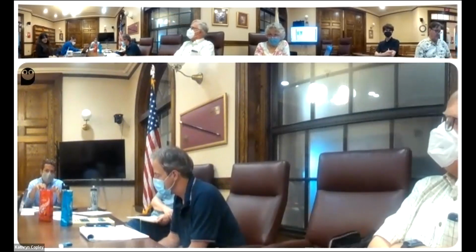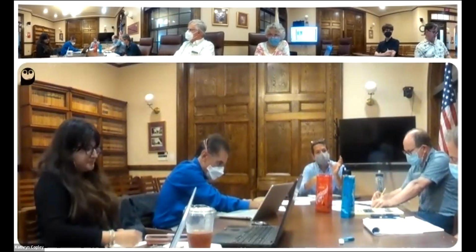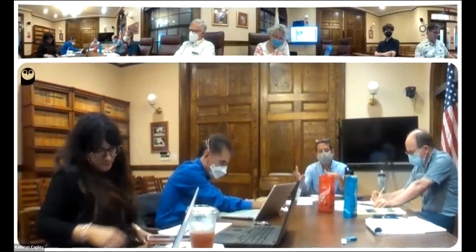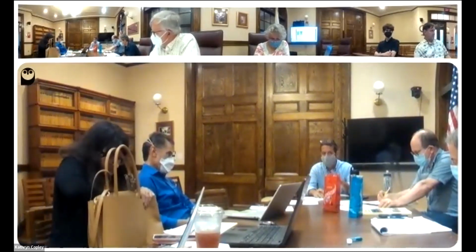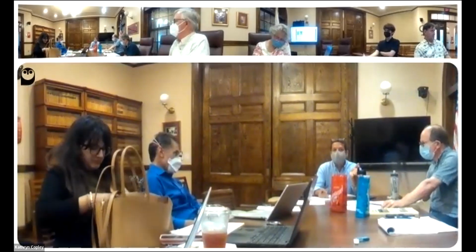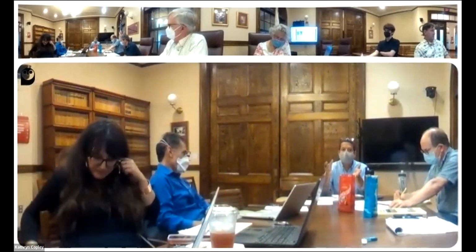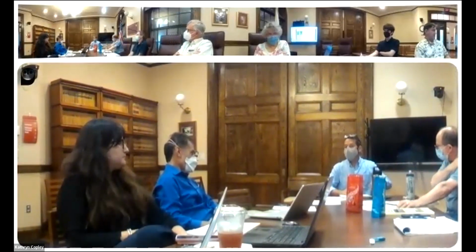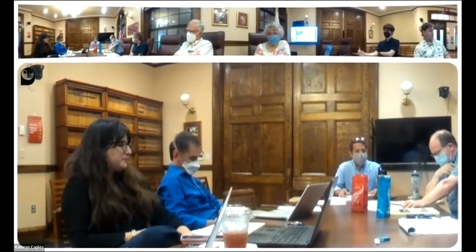So it'd be useful to start to bucket them and start thinking in terms of our climate action plan calendar. When do we want to start to bring these stakeholder groups into the process to help us have a better output at the end, but also to help us activate individuals at the right time? The example I would give is that if we're going to do the community electricity aggregation warrant in the fall, we probably want to be thinking about town meeting outreach sometime after it's adopted as a goal from the select board and before town meeting, so that we get that warrant article passed. And who do we need beyond town meeting to get involved with that? That might be the external groups, homeowners, buildings as well. If we can think of that level of granularity on an engagement plan, it'll help us not boil the ocean.